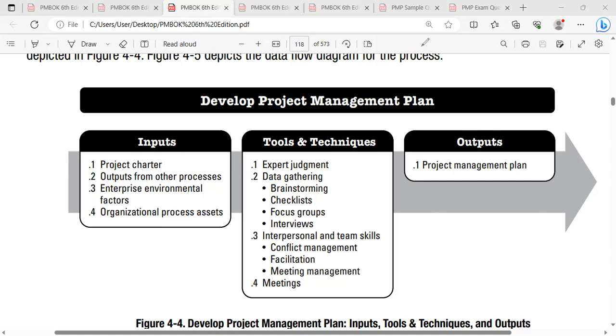So the CCB, the Change Control Board, is the final authority on the changes. To review the changes, they will take the final decision whether to give the approval or rejection. As a requester, you need to send your request form, either manually or through an online workflow engine. You submit it and wait some time for them to do the review. Right or not, guys?